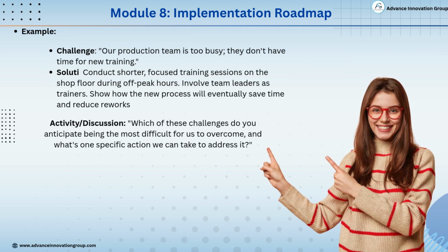Opening. Let's look at a typical hurdle that pops up during implementation. Challenge: our production team is too busy. They don't have time for new training. Solution: 1. Schedule short, focused training sessions instead of long workshops. 2. Hold them during off-peak hours when the workload is lighter. 3. Appoint team leaders as trainers to build ownership. 4. Emphasize that the new process will save time and cut rework in the long run.